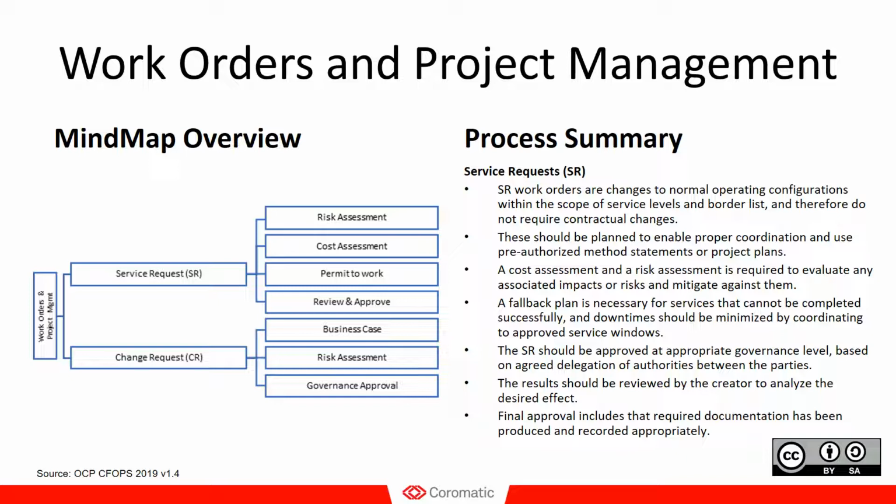One of the most important things, or a critical part of site operations, is to make sure that the site operations is not jeopardized from a security perspective or an operational standpoint. And that means that a service request entails several approval points or decision points, and the first one, or one of the most important, is the risk assessment. If we want to do this work, what are the risks and how do we mitigate these? Can we avoid the risks completely, or how can we minimize the risks of something going wrong?